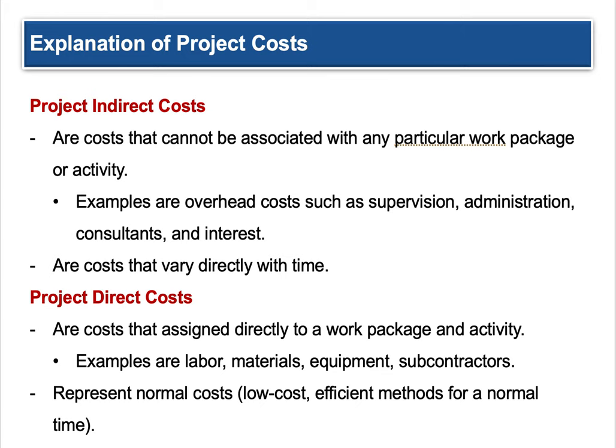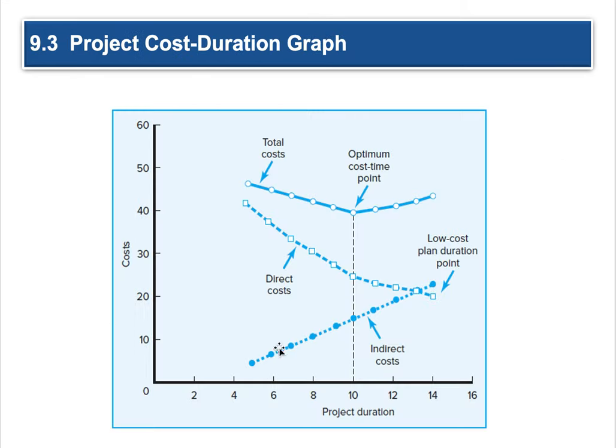Project indirect costs are costs that cannot be associated with any particular work package or activity within the project. Examples are overhead costs such as your supervisor, the administration of the corporation, consultants, and interest incurred on loans. These are costs that vary directly with time — they go up over time. That's the indirect cost line going up.